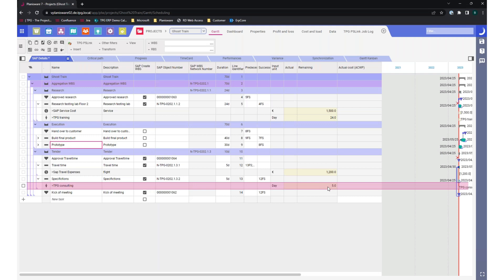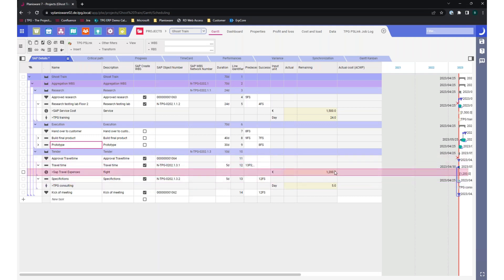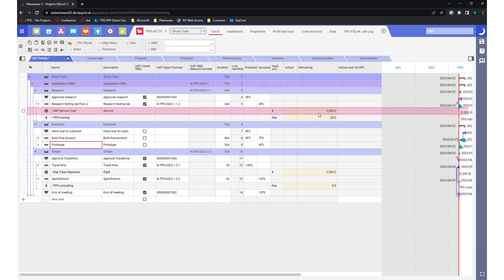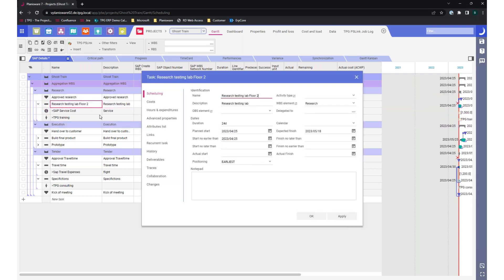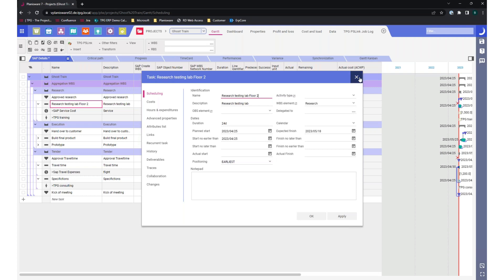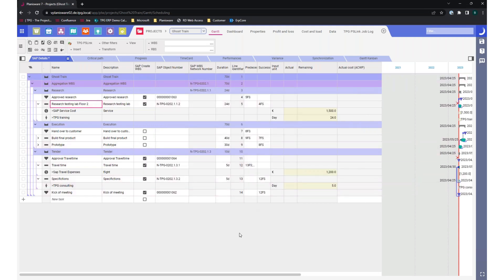And not just as a summary — for this WBS element I need 1,200 euros of primary cost — but in a time-phased manner. I want to know when I need the costs. This task, for example, has a planned start in April but an expected finish in May. So some costs are expected in April and some in May. That's the really interesting part when it comes to financials — and just by planning these things, I can synchronize this to SAP.